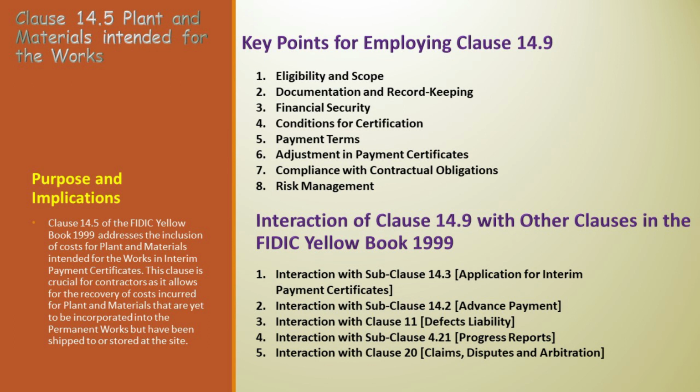Conditions for certification. Understand the conditions for certification. 1. Payment when shipped. If listed for payment upon shipment, ensure they are shipped and en route to the site, with all necessary documents and payment proofs for freight and insurance. 2. Payment when delivered. If listed for payment upon delivery, ensure they are delivered, properly stored, protected, and in accordance with the contract.